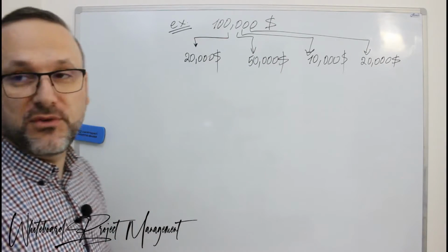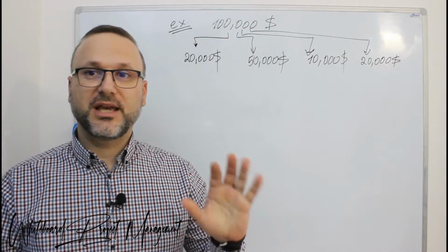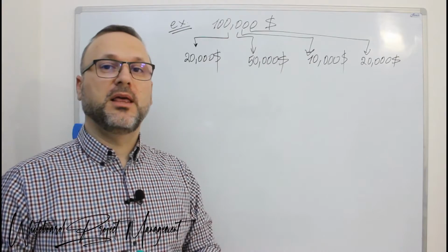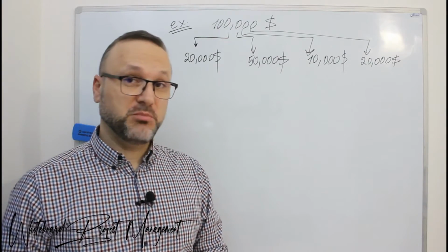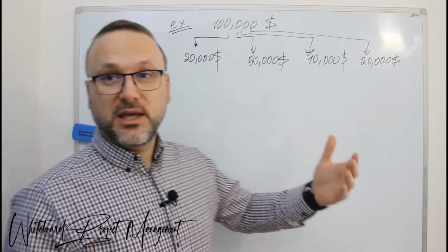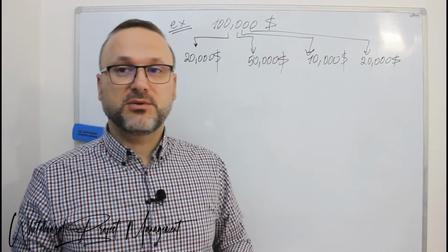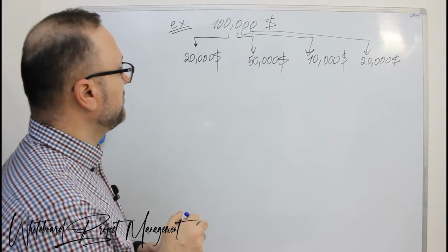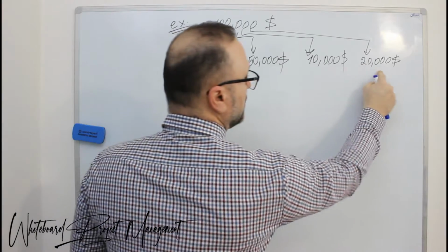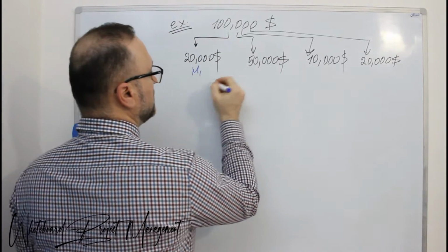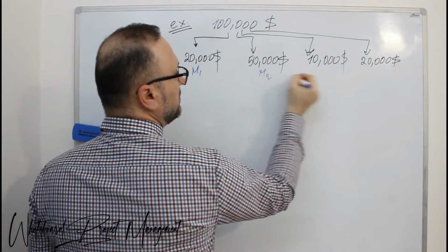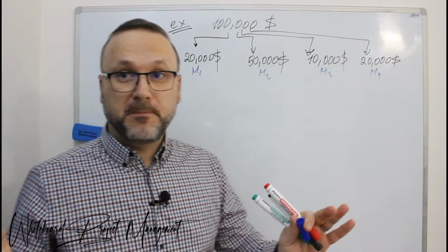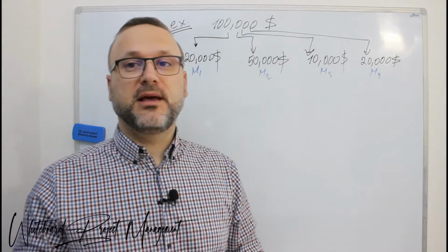If you have your performance bond issued and everything is okay, let's talk now about the guarantee bond. So either you are issuing to the client a guarantee bond from the contract, or the client will say, okay, let me do something from each invoice you have, from each milestone, milestone 1, milestone 2, milestone 3, milestone 4, I will deduct a percentage or a lump sum.